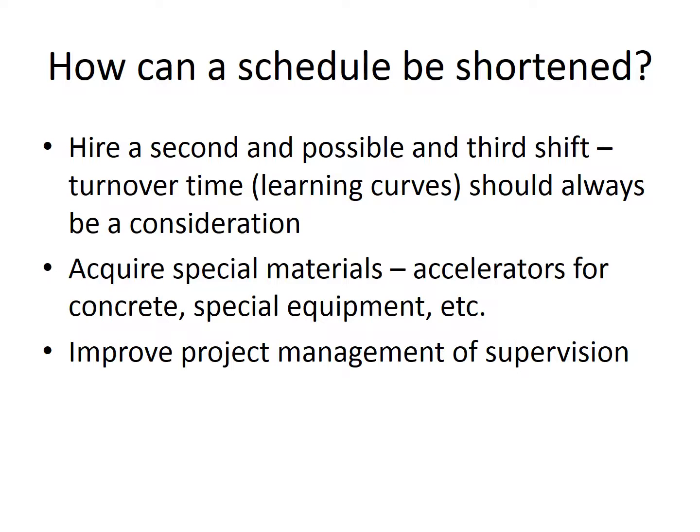Hire a second and possible third shift. We talk about that. There is turnover time or learning curves associated with that. You should always consider that when you're scheduling second and third crew. I can acquire special materials like accelerators for concrete, special equipment.